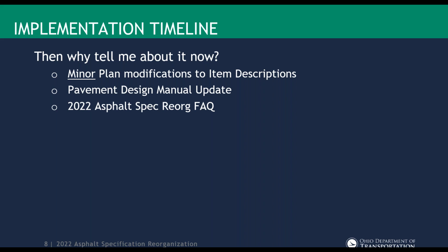And realistically, if a mistake is made and it does get out to the project, it should be relatively easy to address, because the mistake should actually revert us to a lesser acceptance criteria. So even if the contractor didn't recognize it and ask a pre-bid question and it made it all the way out to construction, and we said, hey, this doesn't make sense for gauge testing, I don't think it's going to cause too big of an issue for the contractor or the project staff to say, well, yeah, this was the intent. We'll write a change order to make it go that way.